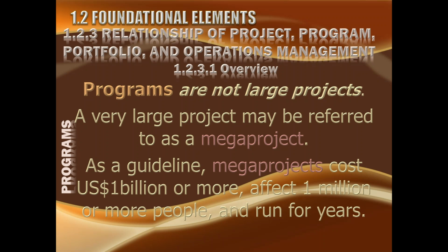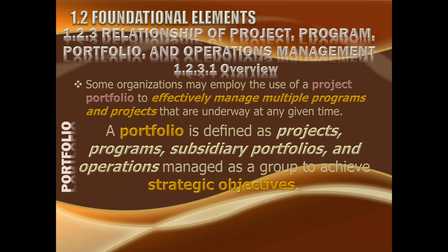A very large project may be referred to as a mega project. As a guideline, mega project cost US dollar 1 billion or more, affect 1 million or more people, and run for years. This is just a heuristic. This is not actual figures, but this is kind of a guideline kind of a figure. Some organizations may employ the use of a project portfolio to effectively manage multiple programs and projects that are underway at any given time. So, what is a portfolio?